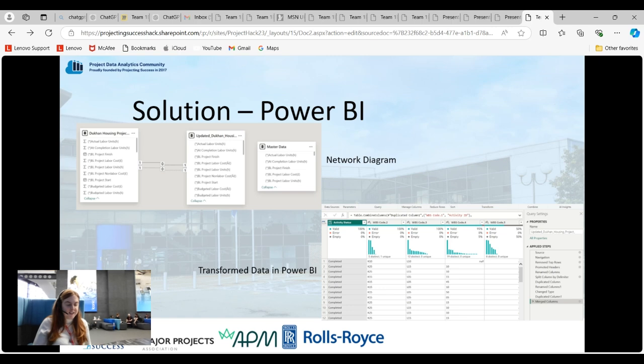Within Power BI, further minimal data cleaning, due to time constraints, was undertaken, focusing on headings from the top row, splitting columns to WBS and key information, and formatting columns. We utilised 2 months of data to create a slippage chart with scope to expand into other charts as per stakeholder demands. Given the limitations with the provided dataset, we needed to create unique identifiers across the multiple sets of data, and again used AI to assist with DAX expressions on more complex issues. The datasets were merged to create a master dataset, so the visualization would pull through cleanly. With a live link to P6 and its data, this would be automated and not required.